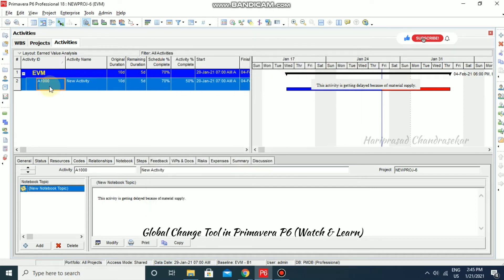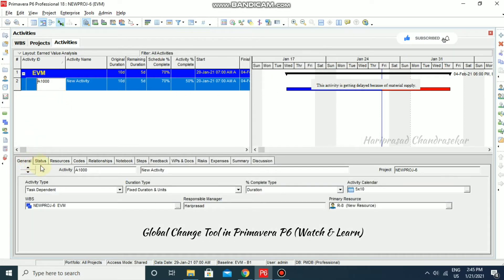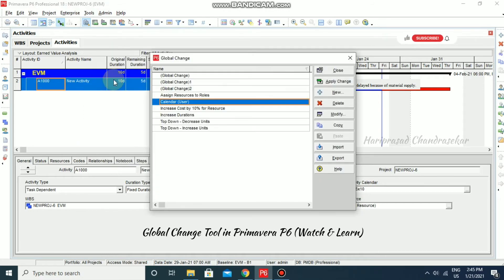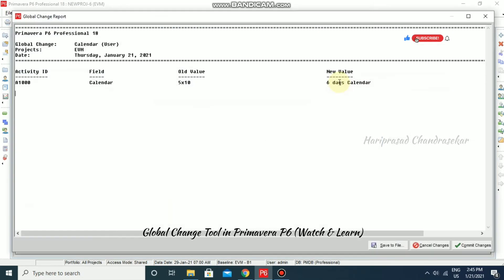In this activity, go to General and you can see the activity calendar is set to Five Cross Ten. Then go to Tools > Global Change, click the Calendar global change, and select Apply Change. After that, click Update Change and we can go for Commit Changes.